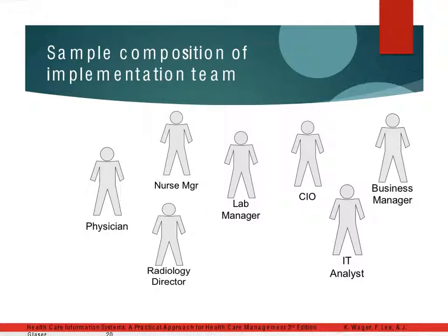You need the people who are actually going to install the system. Staff needs to be trained, in multiple ways, in multiple venues, with ongoing support. You're going to need to talk about how past data is going to be converted. Is it going to be warehoused somewhere? Or is it going to be scanned and available for view only on your new system?